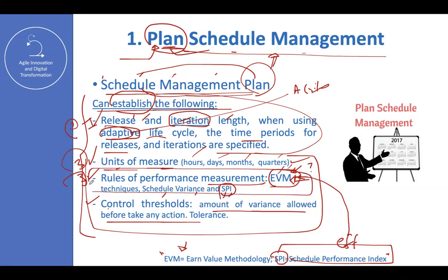Number 4 is going to be part of cost management coming up. And last but not least, number 4, I want to explain a little bit more about control thresholds. Nothing that you put in black and white is 100% accurate. So you need to put into the plan just in case: instead of spending 3 months, maybe we may need 2 more weeks, more or less.